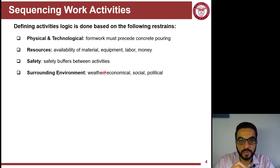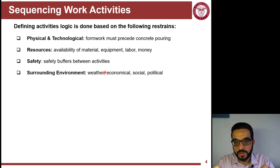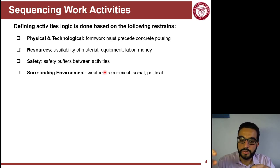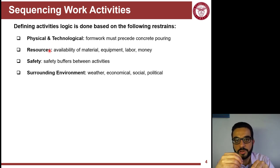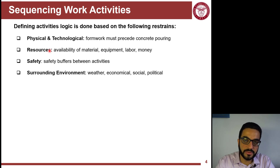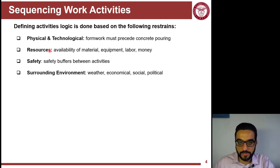The second type of dependency is resources. Things you initially think can be done in parallel may not be. For example, if you have two buildings on pile foundations, they seem independent, but if you only have one drilling rig, you cannot work on both simultaneously. Due to resource reasons, you enforce a logic: do the foundation of the first building, then the second, even though there is no physical or technological relation between them.